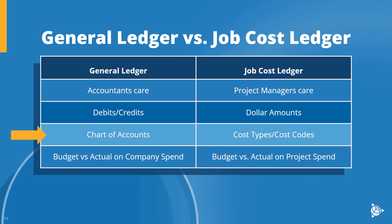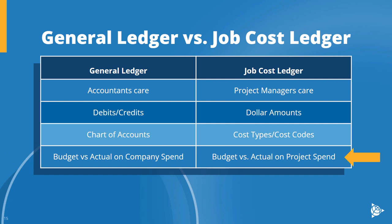When an accountant posts to a general ledger, they are posting to a chart of accounts — things like office supplies, rent, or accounts receivable. But project managers don't really care about the chart of accounts either; they care about cost types and cost codes. An accountant looks at the general ledger and compares numbers against a company-wide budget, tracking things like how much the company has spent on rent or materials so far in the year. The accountant is paying attention to spending across the business, not specific costs on a specific project. For project-specific costs, you'd look at the job cost ledger, where project managers compare a project's performance against its budget.